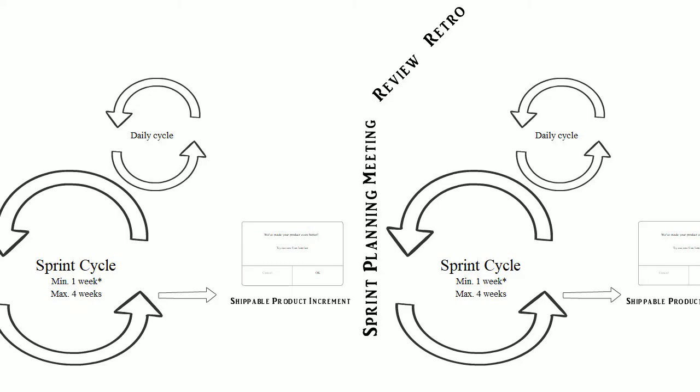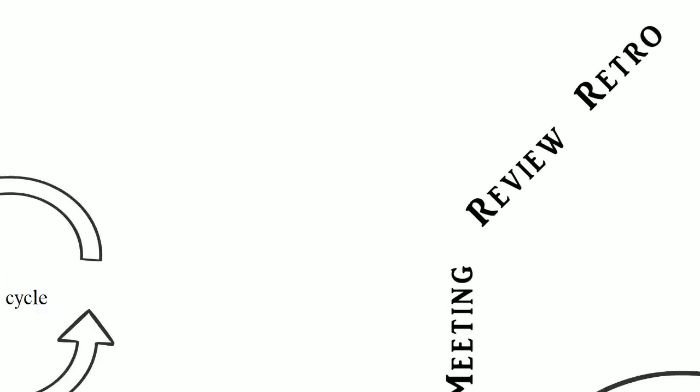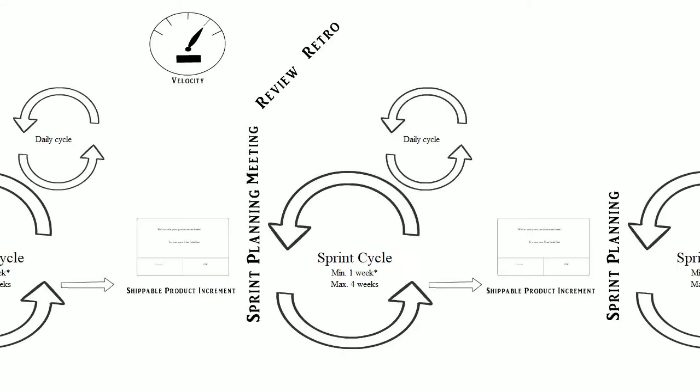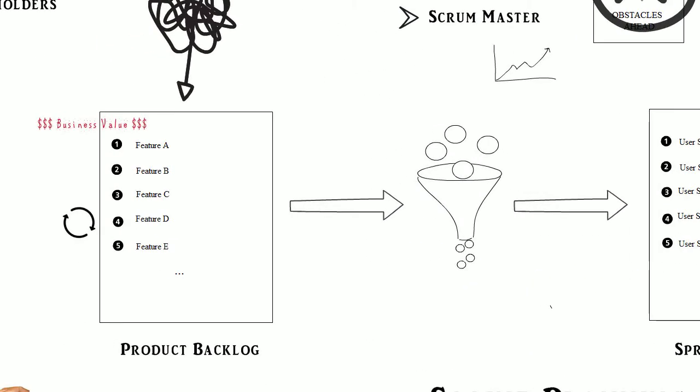During the sprint planning meeting, the team reviews all the user stories in their sprint backlog with the product owner. Based on the team's velocity, that is, based on the historical data trends on how many points per sprint this team was able to accomplish in the past, the team commits to deliver a specific number of points in the upcoming sprint. Should priorities change during the sprint, the product owner is responsible for reprioritizing the product backlog within the committed number of the team's velocity points.